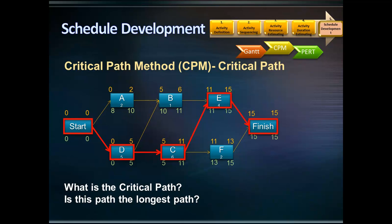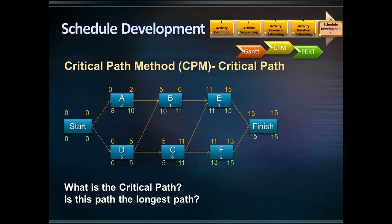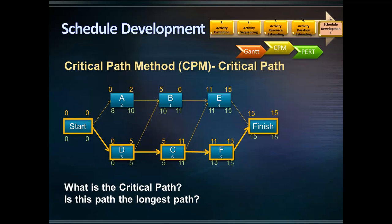The critical path is the longest path. Let's evaluate the different paths in this example. One path is Start → A → B → E → Finish, with a duration of 7 days. Another path is Start → D → B → E → Finish, with a duration of 10 days. Another path is Start → D → C → F → Finish, with a duration of 13 days. As you can see, the critical path — Start → D → C → E → Finish at 15 days — has the longest duration. That's why if an activity on the critical path is delayed, the entire project is delayed.